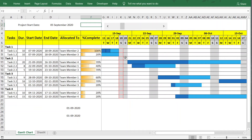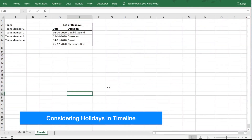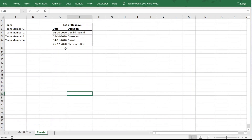To add holidays to the timeline, we first capture a list of holidays. The good idea is to use a Named Range so this list can be referenced by name rather than repeating the range address everywhere. Select the holiday date cells, then go to Formulas → Name Manager and add a named range called 'Holidays'.